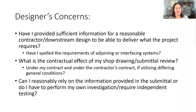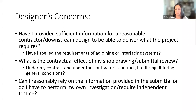From a designer's perspective, the question is: have I provided sufficient information for a reasonable contractor or their sub to be able to deliver what the project requires? Is there enough information in the drawings and specs that calls out the performance criteria that needs to be met, and that provides enough context for the contractor to make their own conclusions about what's necessary to achieve the aesthetic requirements of the project and the performance criteria that need to be engineered?